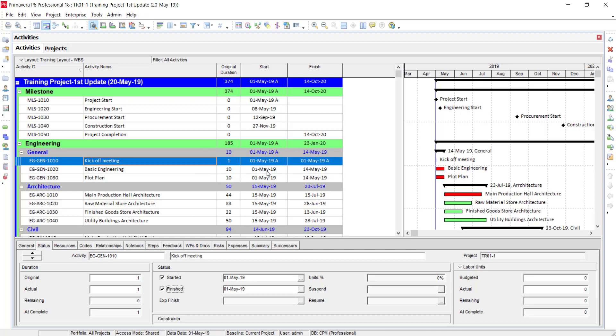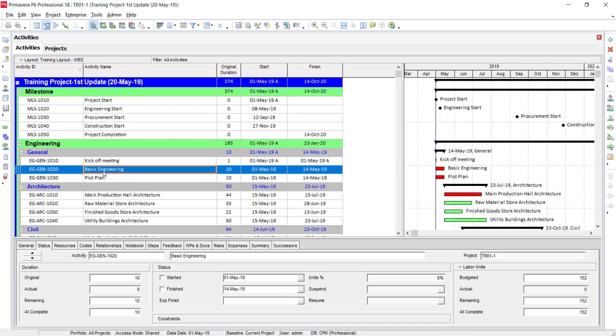You can see that 'A' appears with the date in the Start column, meaning it is actually started. In the Finish column, 'A' also appears, meaning it is actually finished as well. Now coming to the next activity: Basic Engineering.